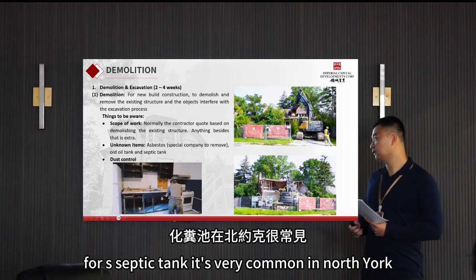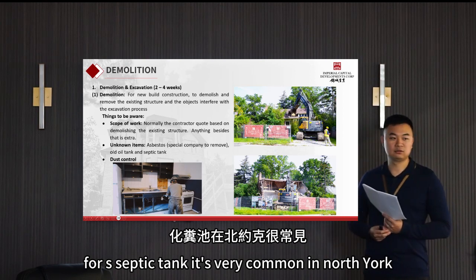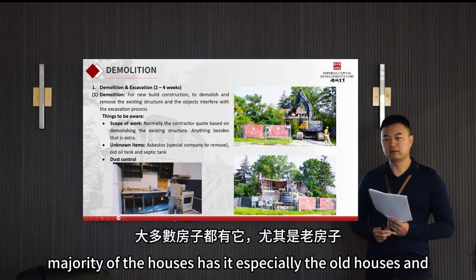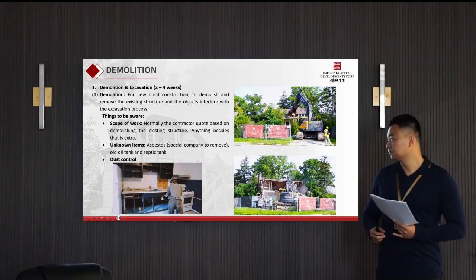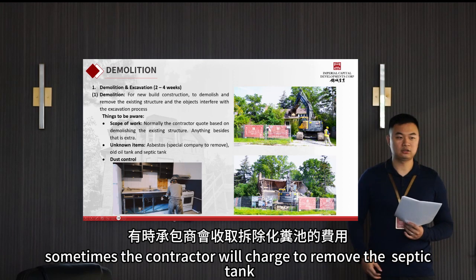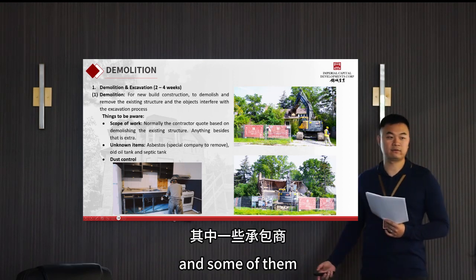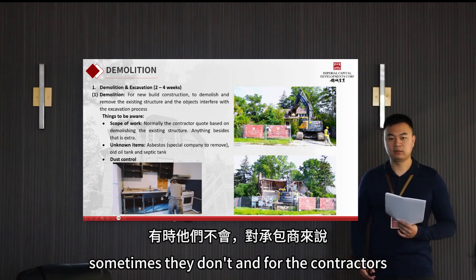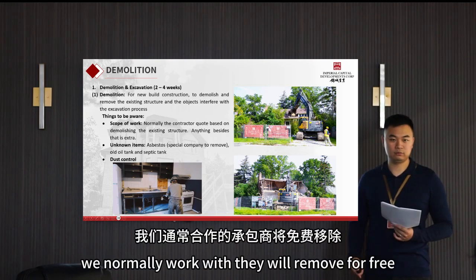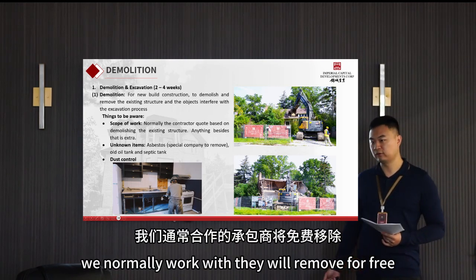For septic tanks, it's very common in North York. The majority of the houses have it, especially the old houses. Sometimes the contractor will charge to remove the septic tank, and sometimes they don't. For the contractors we normally work with, they will remove it for free.